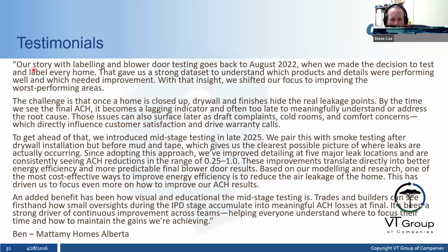He notes that their story with labeling and blower door testing goes back to August 2022, when Mattamy Homes made the decision to label every home, and that gave them a strong data set to understand which products and details were performing well and which needed improvement. That allowed them to shift their insight into focus on the worst performing areas.